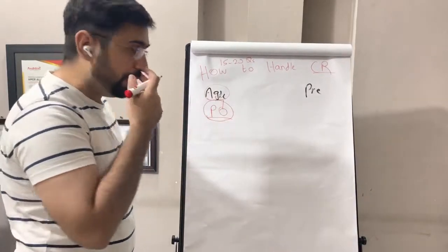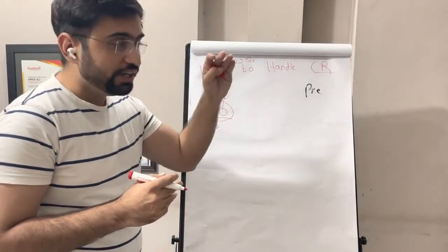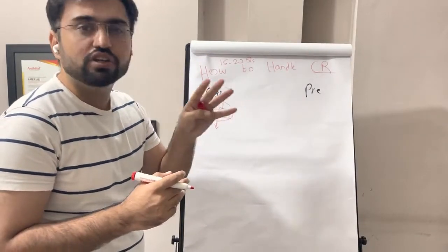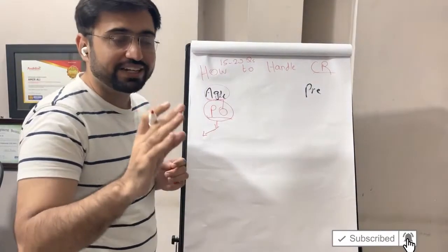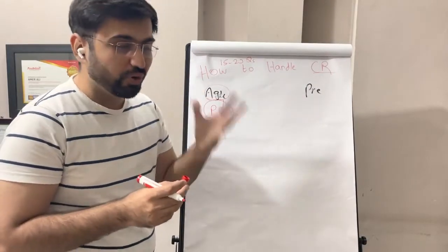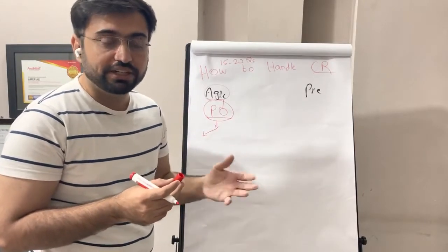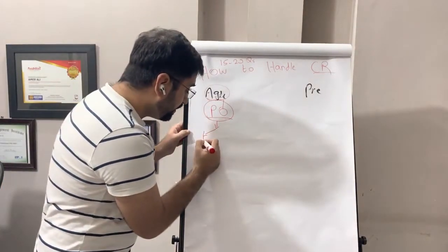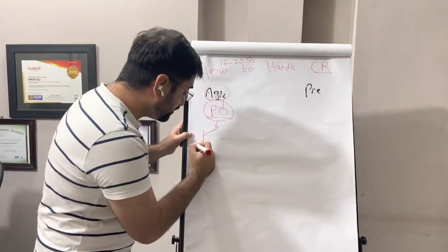The product owner evaluates the change. What is the value of the change? Is it a very high value, very high risk change, or is it a medium value, or a low value? If the change is so important that it can make the current sprint obsolete, for example, if you don't do that change, the current sprint or the product will become obsolete and the work will become useless, then the product owner can even add that change, in collaboration with the team, into the current sprint.